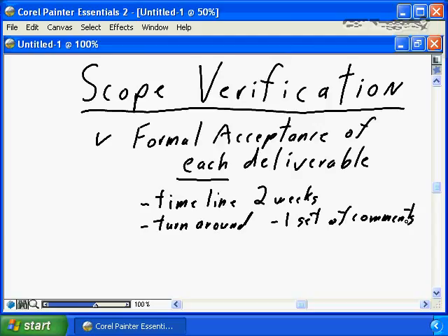Well, you as a project manager don't have the subject matter expertise. You don't have the business knowledge to determine whether black, white, or gray is acceptable. So you need to have a defined turnaround process where the formally defined acceptor is responsible for consolidating the comments from the multiple reviewers and providing a single set of comments back for the revisions that's required.